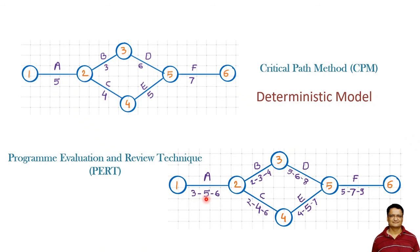But if things go wrong or there are certain issues, this activity may take six days. We are assigning certain probabilities to this activity, and that is why this model becomes probabilistic in nature.